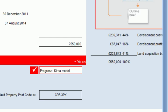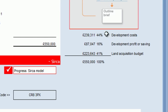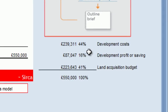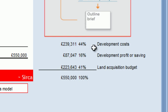We then looked at the impact of our choices on the main categories — the development costs. These are all the costs you would incur in carrying out the work to complete a four bedroom house ready for sale. There's also an element allowed for a developer's profit. The result is a total from which we deduct costs, leaving us with a budget for acquiring the land.